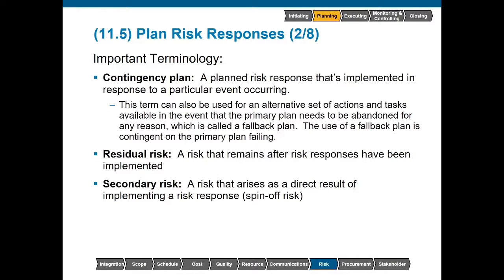Now, there is still a residual risk, even if we start that campfire. A residual risk is a risk that remains after responses have been implemented. Starting a campfire does not necessarily mean that we're going to be warm.